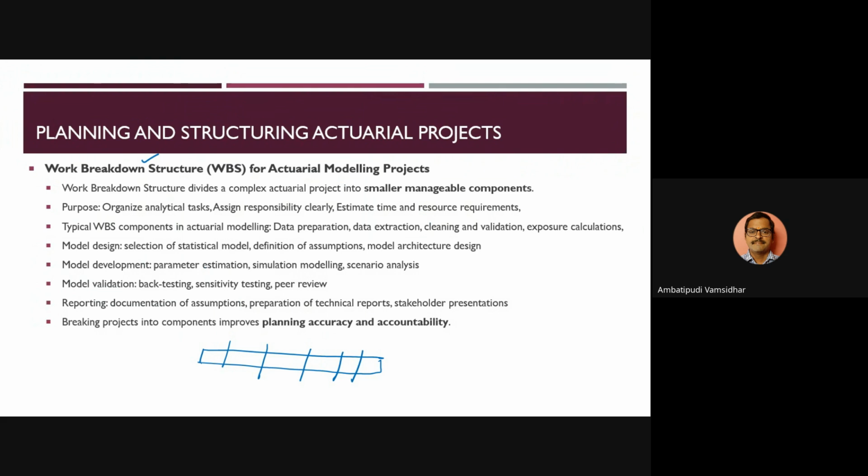The major purpose is that for each of them you can assign who will be responsible for executing this part of the project, how much time they will take, and what kind of resources are required to execute it. So that is what a work breakdown structure is.